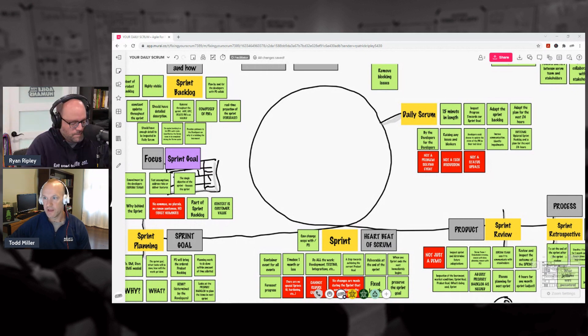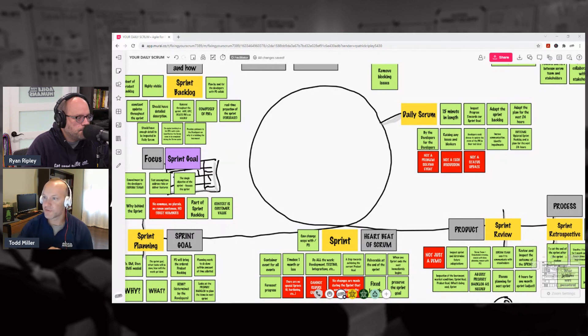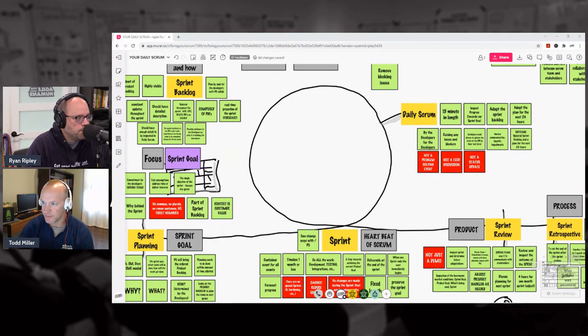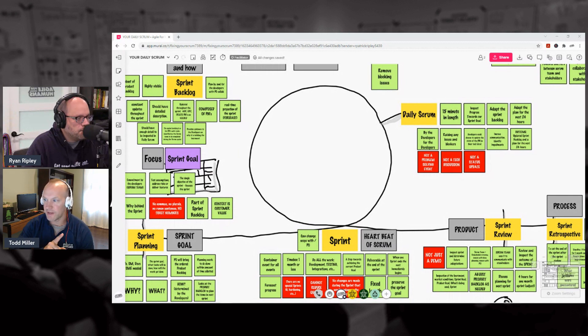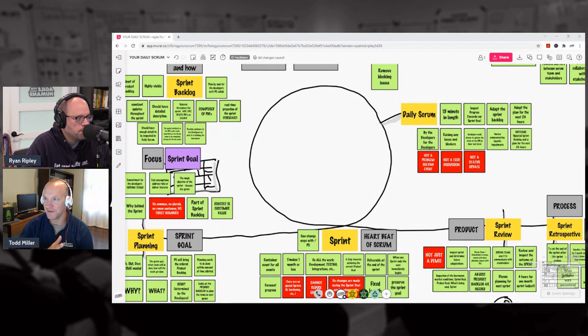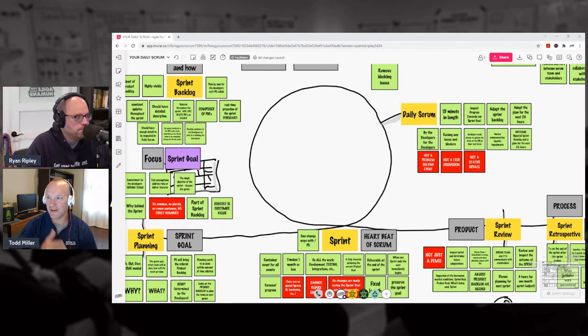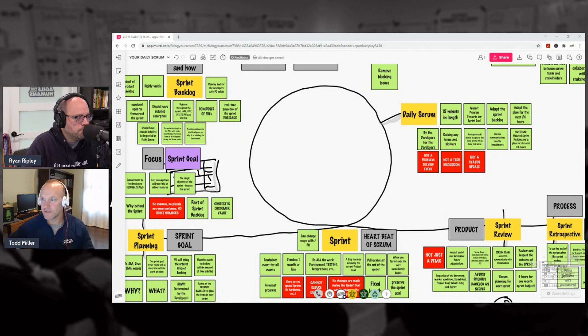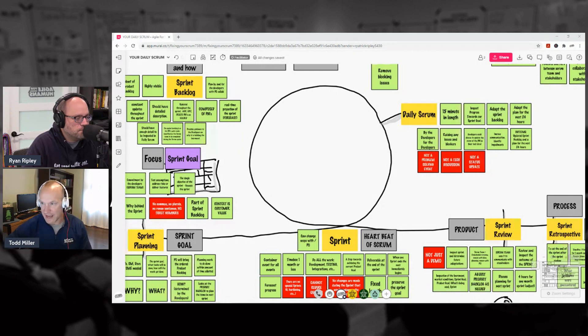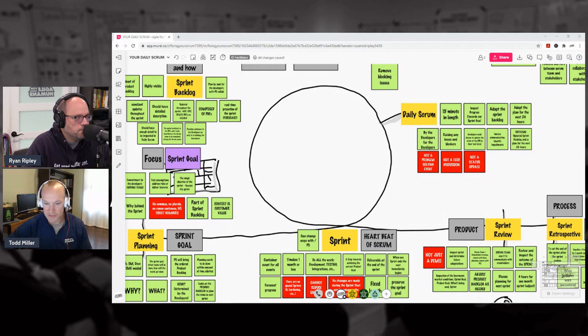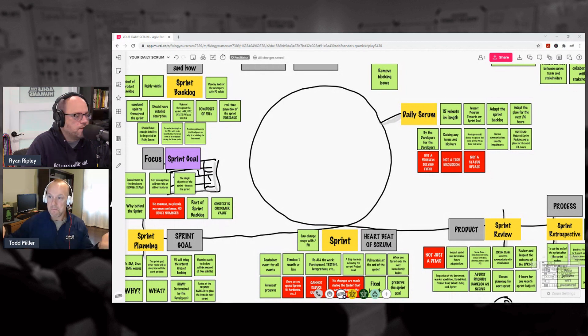I like it. Following that, each and every day we have a Daily Scrum. The Daily Scrum is by and for the developers. It's for the devs to get together and figure out how are we going to make progress today towards our sprint goal. Are we stuck? Are we making good progress? And how do we keep that progress transparent through the emergence of a sprint backlog?